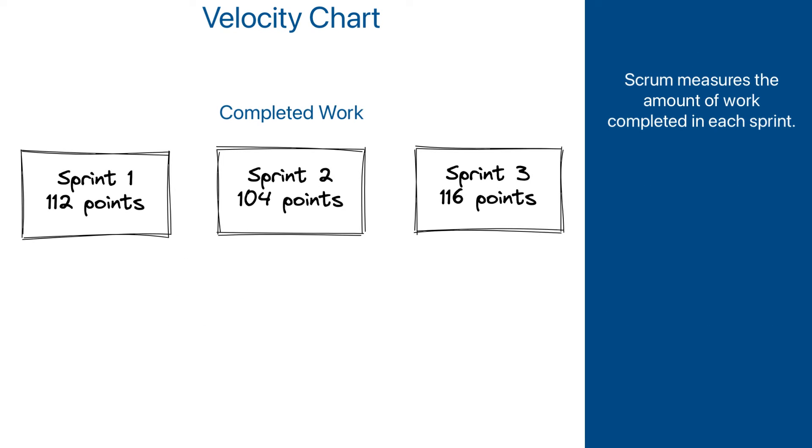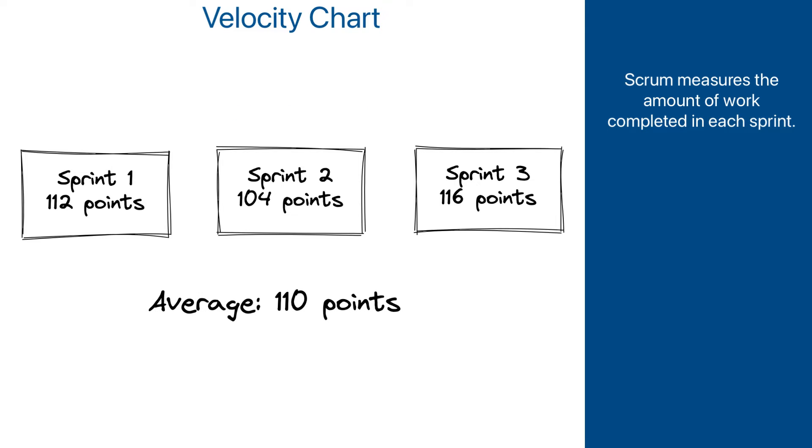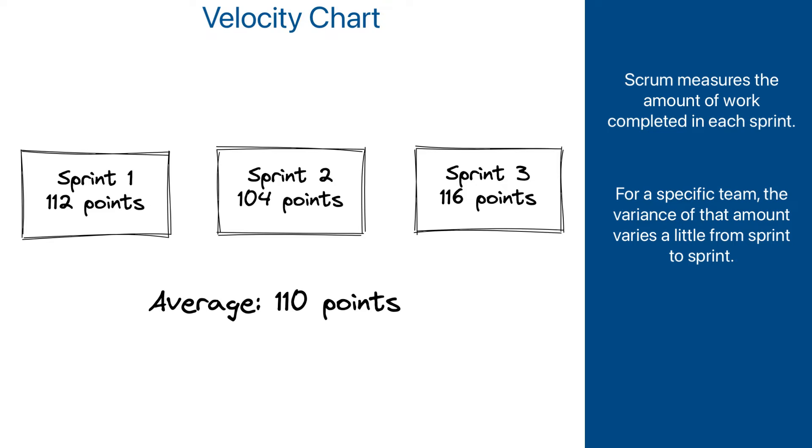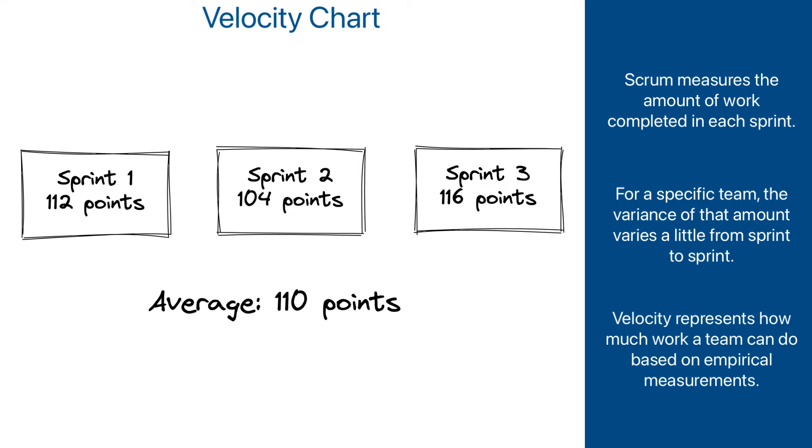Scrum introduced the concept of velocity, which uses a reversed approach. Instead of forward planning how much work a team can do based on some generic assumptions and not taking into account the capabilities of a specific team, Scrum measures over the course of several sprints how much work a team did in every sprint, and then uses that number as an indicator of capabilities of that team. It has been proven that such number tends to fluctuate very little from one sprint to another, and it has established itself as a valid and fairly reliable measurement of team capacity.